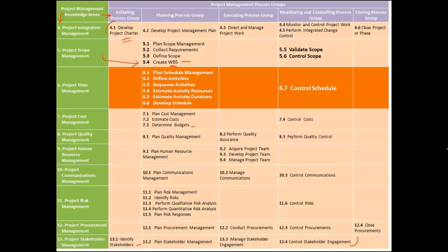So, in other words, the WBS breaks down the entire project scope into small work components which are easily manageable, and we can do all the estimations, scheduling, planning, controlling, etc. not on the entire project scope, but rather on the smaller work components. So it makes project management very easy.